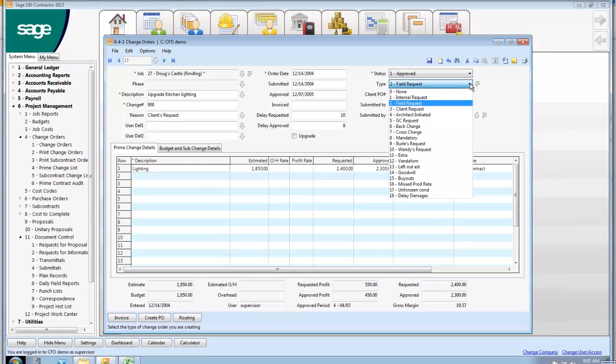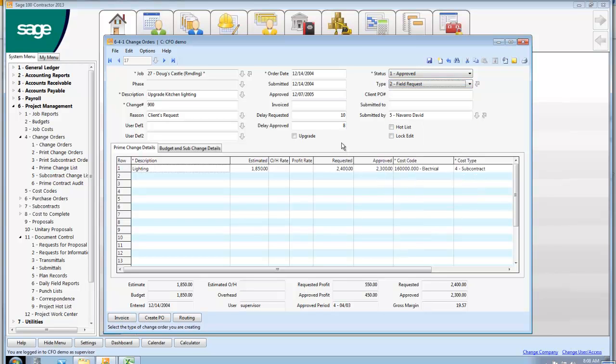The other thing we do for some other people is what kind of change order is it? This is more for internal purposes because I like to just know, does somebody come out and steal all my trees and I have to order them again? Did I think I could plant 20 trees a day and I could only plant 10 trees a day? So I need more labor hours, so I have to increase my budget. Those kind of things. But that way you're able to track and see where you might have missed your bid.